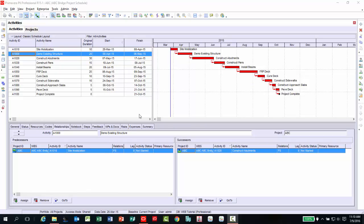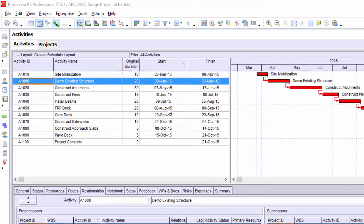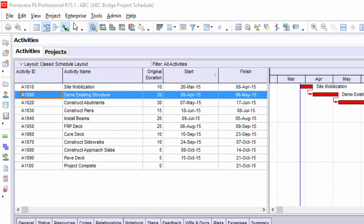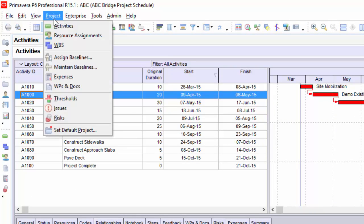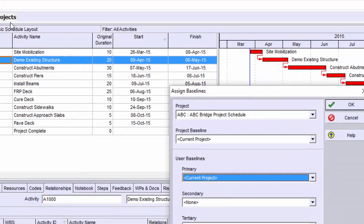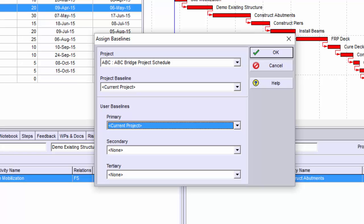Under the project menu, select Assign Baseline. From this dialog box, you can assign a project baseline, primary, secondary, and tertiary baselines to the project.